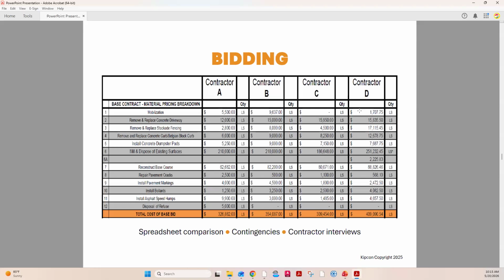It's because the contractors each have a different size company, different size crews, different equipment, different access to materials. So there's all these factors that go into contractor pricing. Also, do they really want the job? Are they so busy that they're throwing a price out there because they know they're just busy and swamped, and if they can do the project for this price, they'll make it work. So there's different reasons why contractors give different pricing. So it's not always apparent to the engineer or to the board that's reviewing the bids.